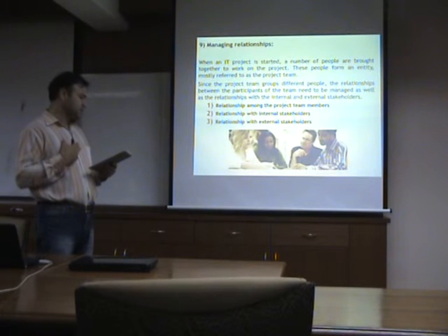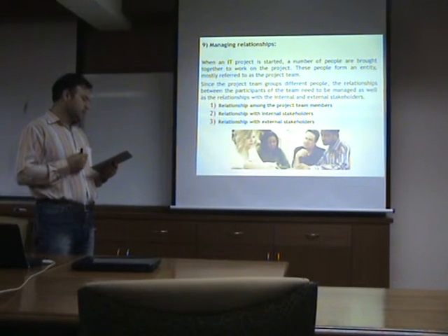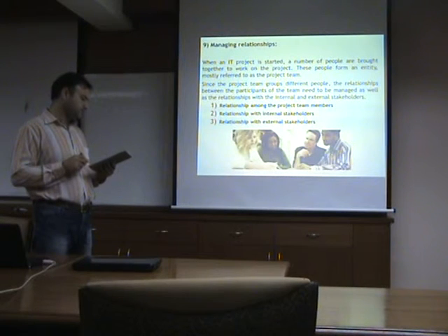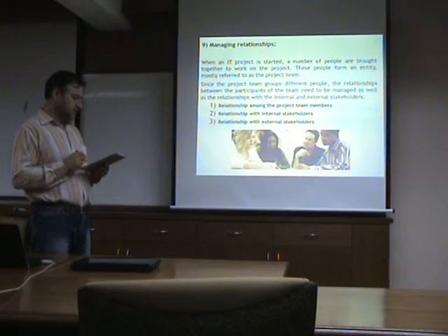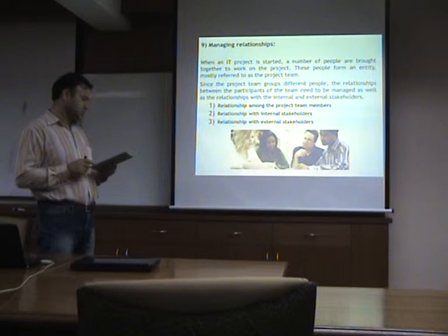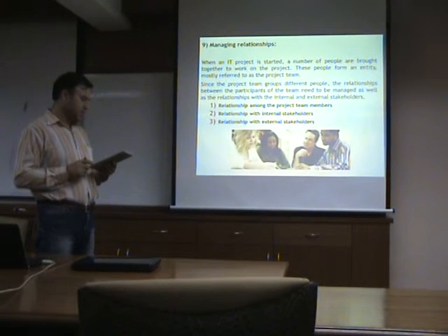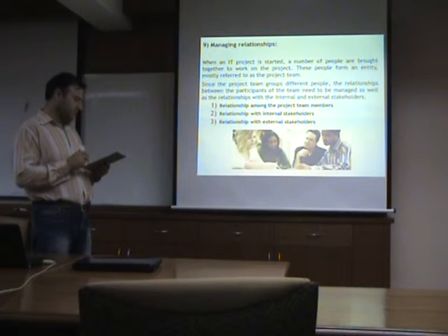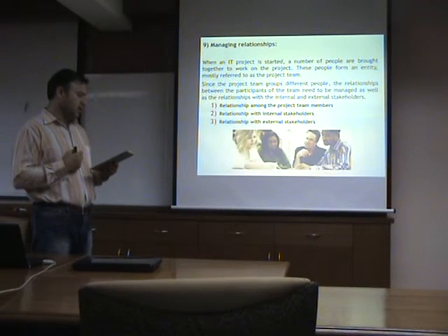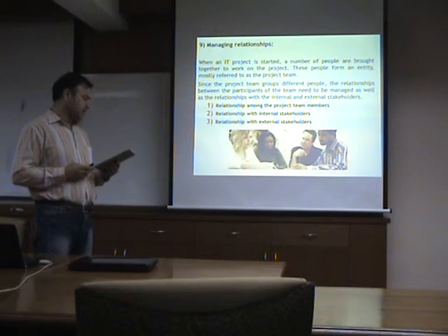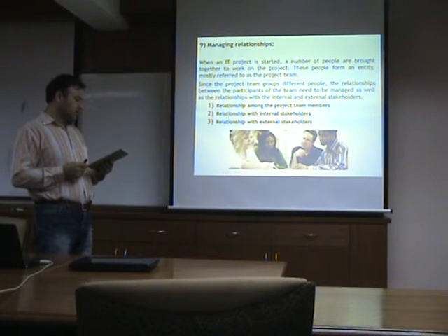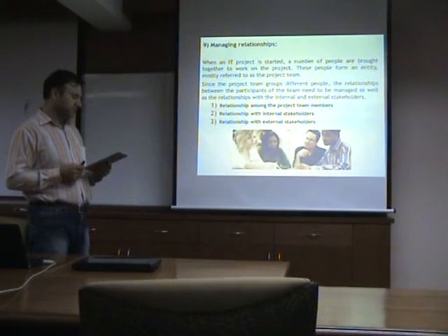The third one, relationship with the external stakeholders. The impact of the project is not limited to the organization. It may influence several external stakeholders such as the union, clients, subcontractors, etc. The project may provoke a resistance to change in every one of these groups. At the same time, a lot of external factors can limit the objectives and goals of the project. In fact, an analysis of the causes of project overruns shows that external factors are the principal cause.